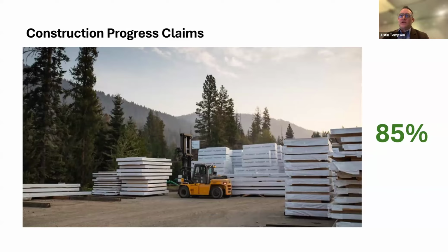So having the owners understand that, wrap their heads around that, Fast Temp is really good to explain that as conventional, because the labor of the erection was actually just a very small portion, but acquiring the product, pressing the product, and the logistics of getting it ready to ship was the bulk of the work. So anywhere from 75 to 85%, if you're seeing a progress draw showing that high percentage and you haven't even seen a piece of wood on site yet, that was the one unique element that we had to wrap our heads around.